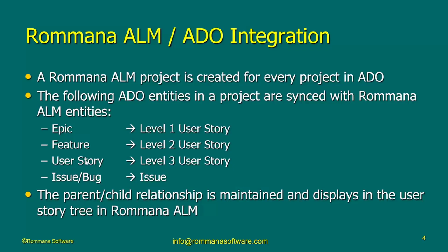And of course, you can certainly, in my opinion, based on my 20 years of experience working with user stories, a user story can be broken down into multiple user stories. And in this case, a user story is no longer a user story, but rather it is an epic that you're breaking down. But it can't be a feature because you cannot break down a user story into features, because features are supposed to be higher level than user stories. Anyway,